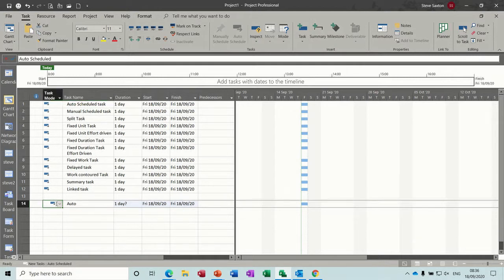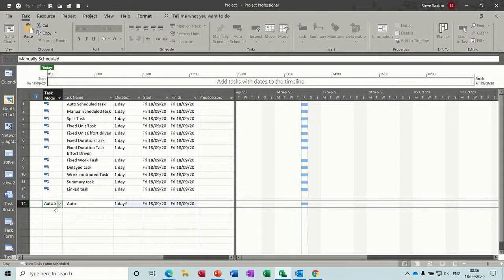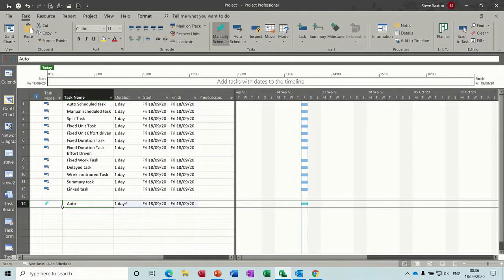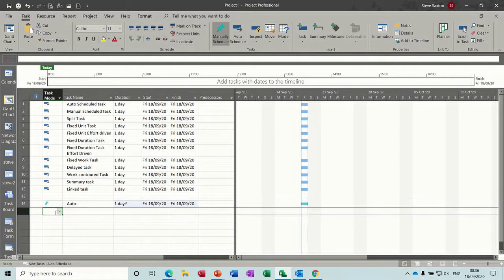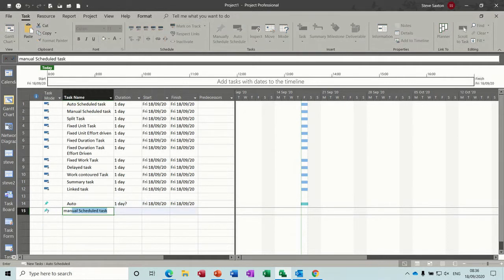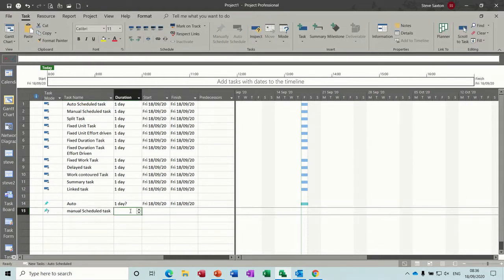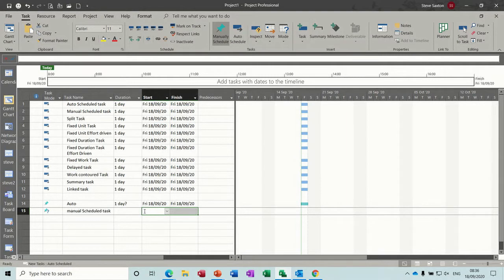Now if I change that to manual, which is the default when you buy project, nothing's happened to it at the moment because I've already created it. But if I just put this next one to manual, this blank one, and then call that manual, you can see the difference with this. Nothing appears in terms of dates and icons on the Gantt chart is blank. So that's the difference.